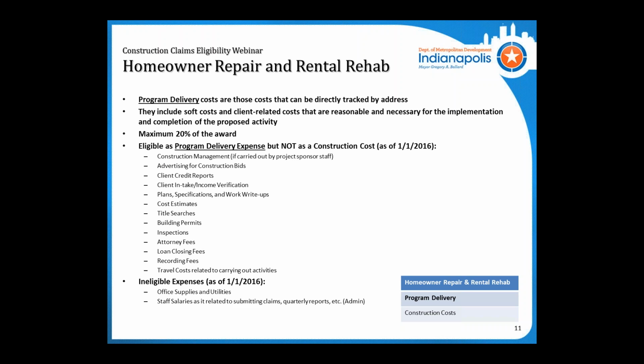Some of these have been claimed as construction costs in this grant year and past grant years. So we want to reiterate that we'll be changing this as of January 1st, 2016. All these below expenses will be only allowed as program delivery expenses. For example, some recording fees and title searches, as well as loan closing fees, have been claimed as construction costs. Going forward, starting January 1st, those will have to be under the program delivery expense line, as well as construction management if it's carried out by project sponsor staff. If it's carried out by a contractor, that would be a contractor expense. But again, that is subject to DMD approval, and we'll need to see copies of those contracts.